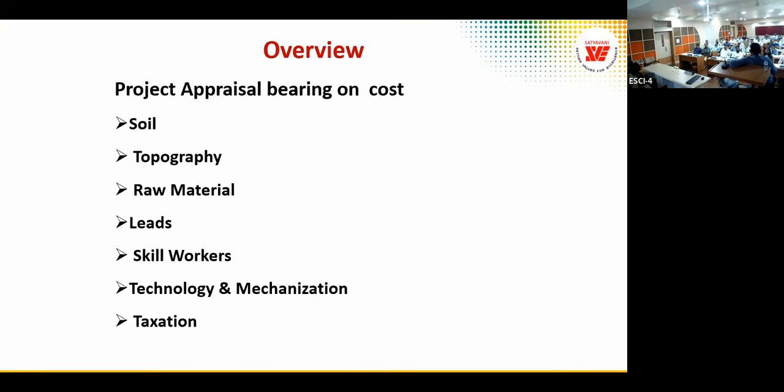We had projects where 2,000 people were there, for example. So 2,000 into 130 rupees, that is 2.6 lakhs per day. 75 lakhs per month. A 12 month project is 30 crores... 9 crores is the cost of labor camp. Operation and maintenance, capital cost, installation and dismantling. So this is the thing.